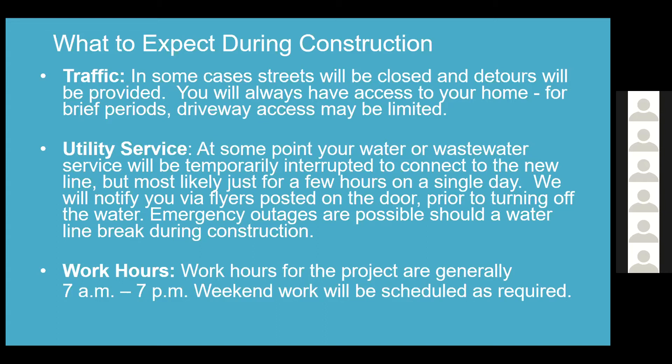We generally give at least 48 hours notice before any shutoffs for line switchovers or testing - that's correct. Our work hours are generally 7am until 7pm. Some weekend work will be scheduled as required, and we'll include that in flyers and notifications. Most of the time it depends on weather, but there may be times we have to do additional weekend work in order to maintain our schedule.